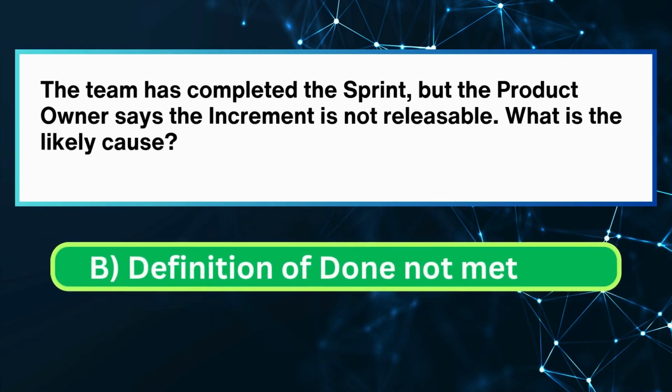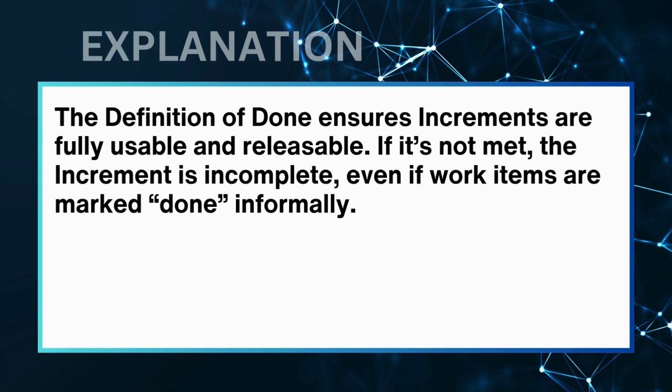The correct answer is B. Definition of done not met. The definition of done ensures increments are fully usable and releasable. If it's not met, the increment is incomplete, even if work items are marked done informally.